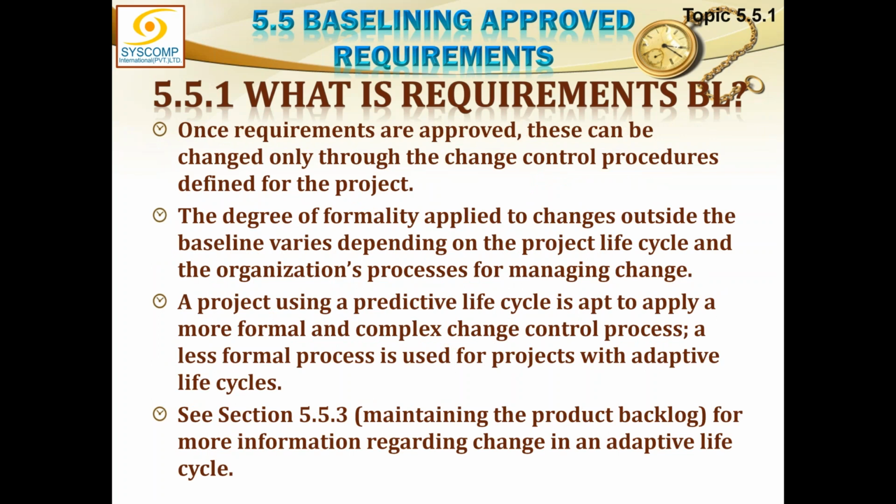Once requirements are approved, these can be changed only through the change control procedure defined for the project. The degree of formality applied to changes outside the baseline varies depending on the project lifecycle and the organization's processes for managing change. So whatever change management procedure is described for the project in your organization would apply, but none of the requirements will be accommodated into the baseline without a proper change request. A project using a predictive lifecycle is apt to apply a more formal and complex change control process.